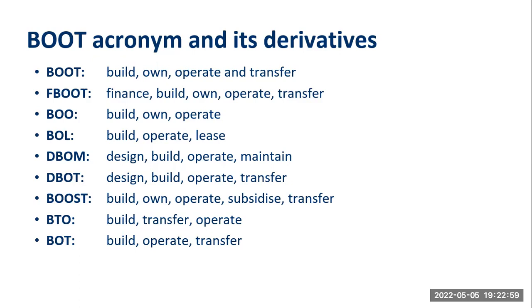So sometimes they give them 10 years to build, own, and operate it. So all the monies for the first 10 years will go to the investor. And after the 10 years, they now transfer to the university. So this is some of the arrangements here. And after the 10 years, the university will now take it and then operate it and own it forever.